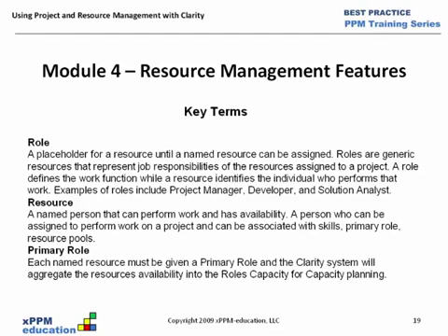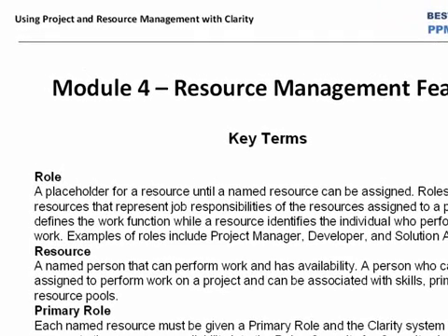So that's our objective: we want to begin the initial planning on a project and develop the project plan with a placeholder role. And then once we know what the requirements are in terms of demand, start, and finish amounts for that role, that demand amount can be communicated to the resource manager, and a resource can be found to replace the role.